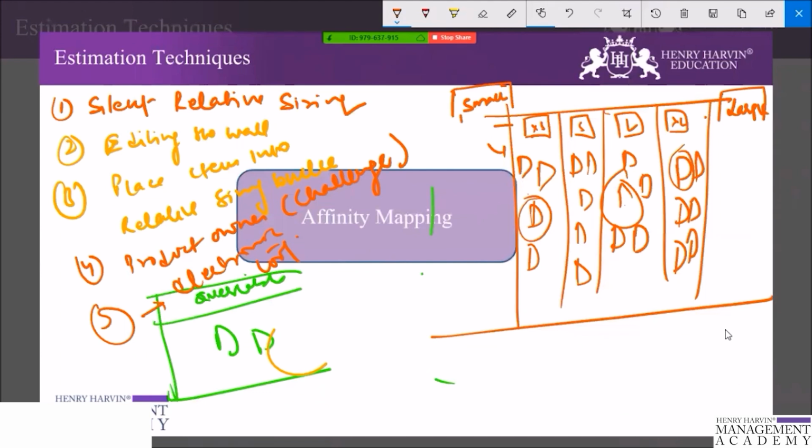It is best when you have at least 40 items, which allows for grouping to easily become apparent. Also, some product backlog items are not understood enough to estimate at all. So place these in a space separate from the estimating wall, so that the product owner can take them away and clarify them.